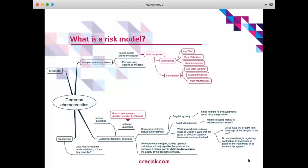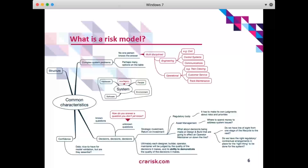So what commonalities did I spy when reviewing these models? Structure is the obvious one. There are complex system problems out there that no one person knows the answer to, and you might have many options on the table — but structure is a critical element to a risk model. If not one person knows the answer, you need to get many people around the table from the engineering and operational disciplines: civil, control systems, communications experts, and on the operational side, train crewing, customer service, track maintenance.